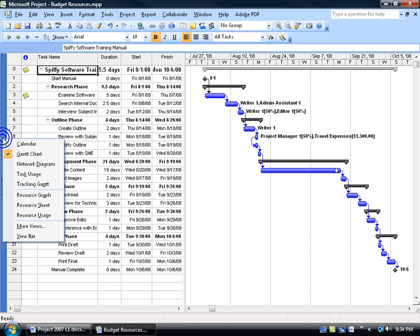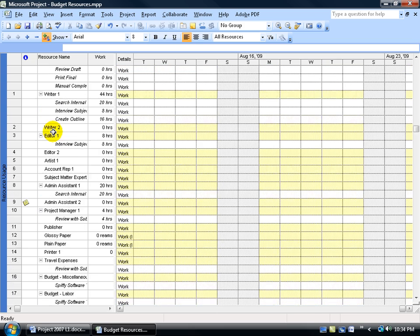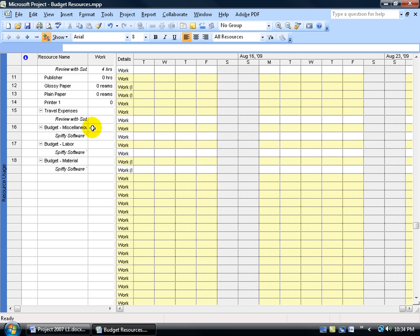Right-click on the collapse view bar and go to the Resource Usage view. The operative words are 'resources used' — it lists all the resources and underneath each resource, any tasks they're assigned to. Writer one is assigned three tasks; writer two has none. To find the budget resources, scroll down until you find them. We have the budget cost resource — I named it budget miscellaneous but assigned type Cost to it. I can give it any wording as long as it has the Cost type assigned. So I have my miscellaneous cost, my labor, and my materials.